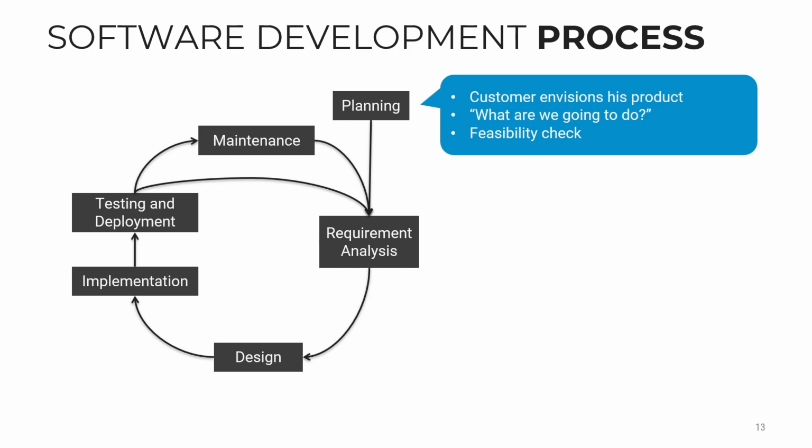Well, if it takes like 20 years, maybe we don't need that. Maybe Star Destroyers would do the job, and so on. You need to check all these angles, and this is part of the process called the feasibility check. In the feasibility check, you want to make sure that the project is financially feasible, personnel feasible, and of course, can we do it in time.